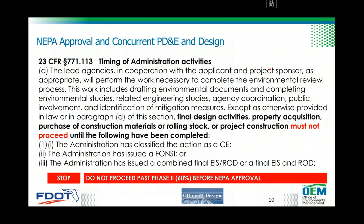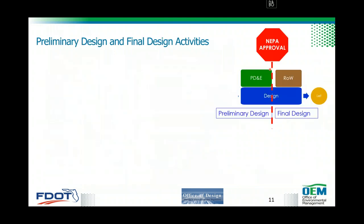Title 23 CFR Section 771.113 states that lead agencies will perform work necessary to complete the environmental review process — drafting environmental documents, completing environmental studies, related engineering studies, agency coordination, public involvement, and identification of mitigation measures. Final design activities, property acquisition, purchase of construction material, rolling stock, or project construction must not proceed until the action has been classified as a CE, a FONSI from an EA, or until a combined final EIS or final EIS in the record has been issued. So you can overlap PD&E and design, but you cannot perform final design activities before NEPA is cleared.